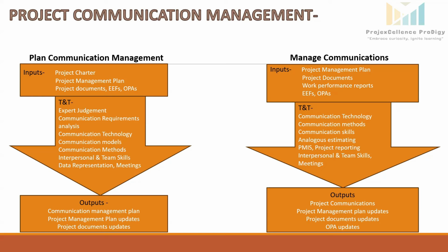It outlines how project communication is structured, monitored, and controlled. Stakeholder engagement plan, which specifies communication strategies to engage the stakeholders. Project documents. Various project documents are referred to as inputs, like the change log, which tracks and informs stakeholders about approved or rejected changes. Issue log communicates ongoing issues and resolutions. Lessons learned register, which helps improve communication based on past experience.